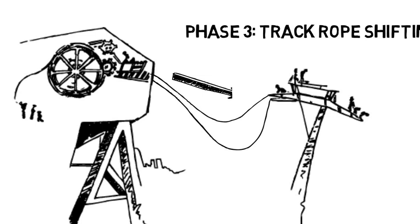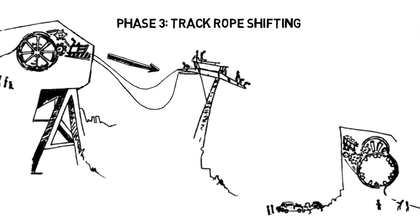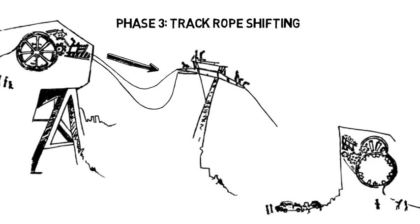Next, crews will reset plate clamps at both ends. To reset the clamps, they'll torque and inspect 24 bolts 100 feet away from the terminal. Then, the process starts over for the next rope.